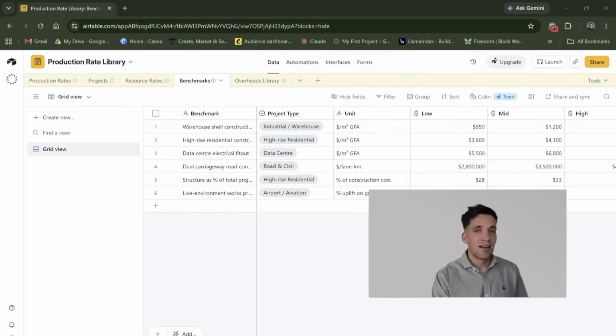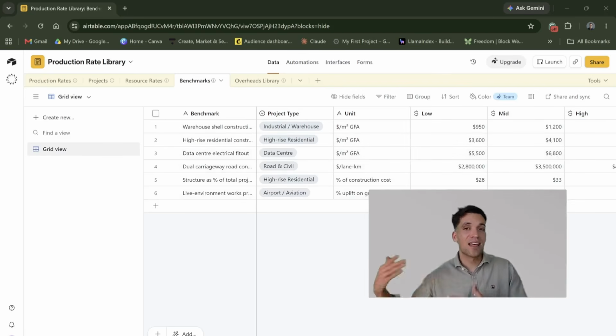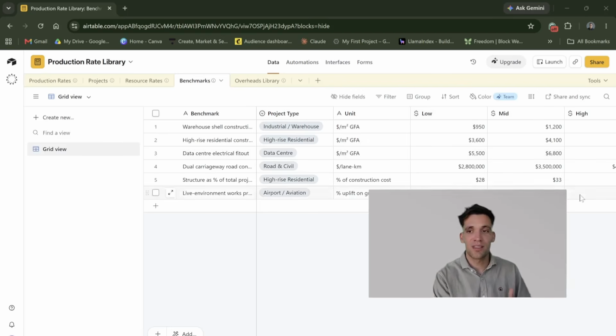Now, again, I would say this is a system you would use for budget and conceptual estimates. I would not be using this for lump sum, hard dollar construction projects. I have done another video on where I would integrate AI into that process if you're actually preparing a lump sum estimate with more of a plus or minus 5% accuracy. But this, again, depends a lot on the quality of data and the input information you get into this process. But again, this is something I would use more for conceptual and budget estimates.